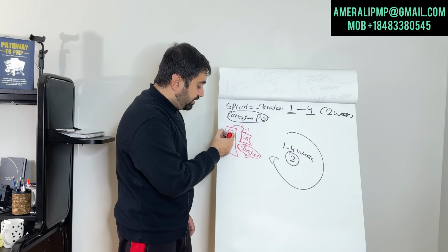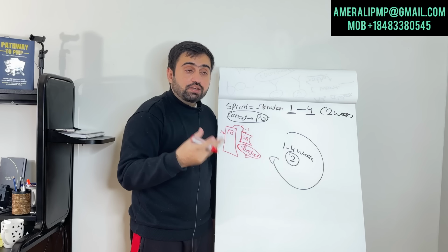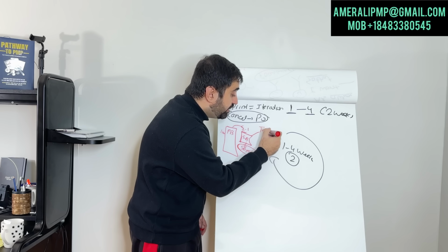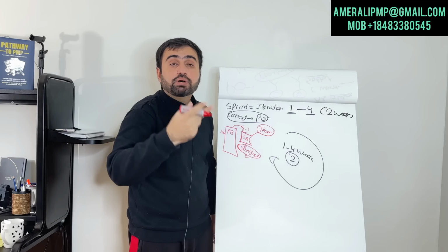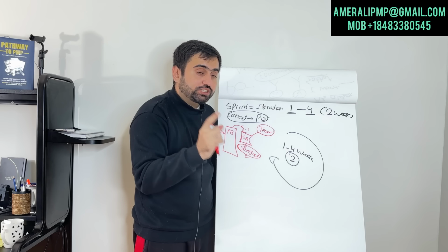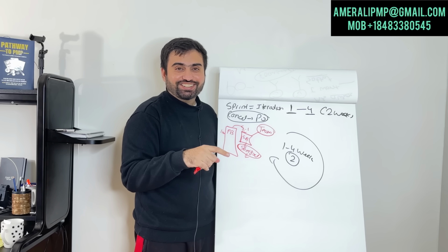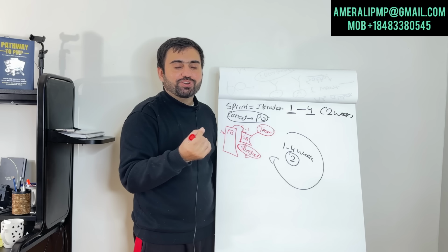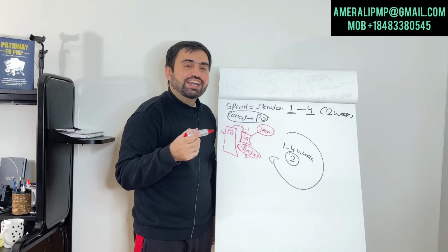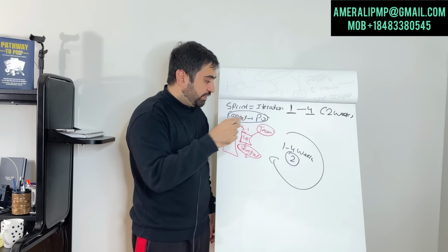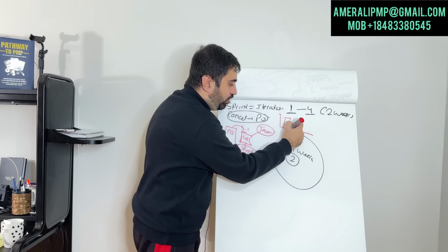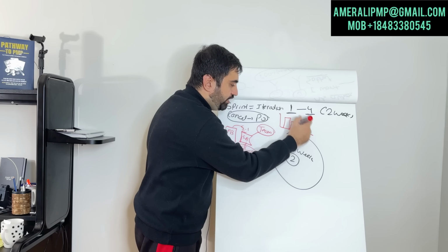Let's say it has 100 user stories in it. The team, very important, the team will decide, let's say for sprint 1, how much we can complete in one sprint. The number of story points you can do in one sprint is called velocity. It's the same thing: how much work you can do in 2 weeks, right? That is your sprint velocity. Initially, we will have an estimated velocity. So as we move, our goal is to stabilize the velocity, right? That is our goal.